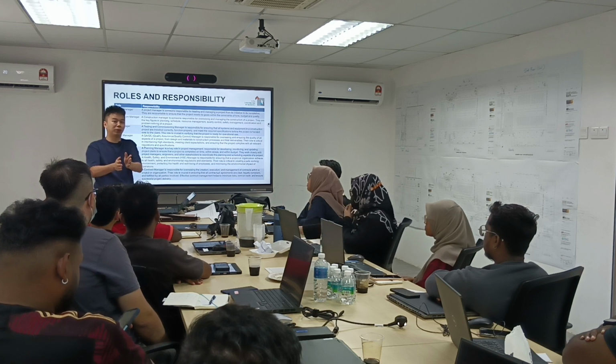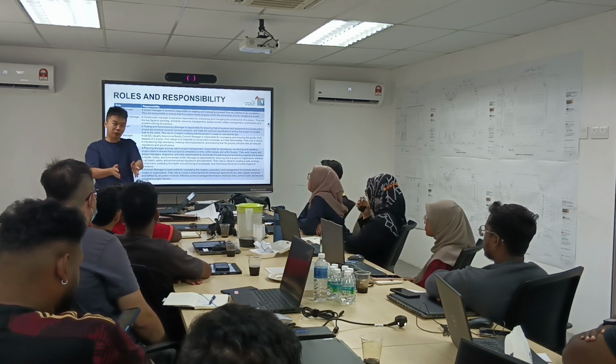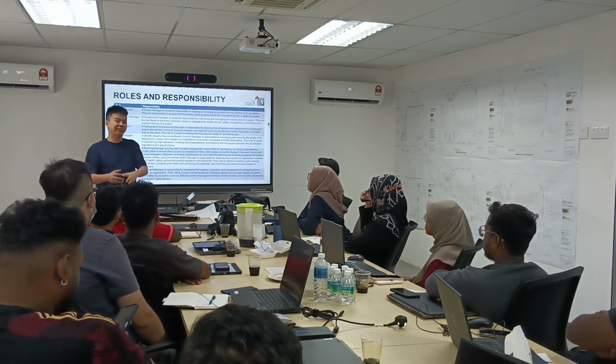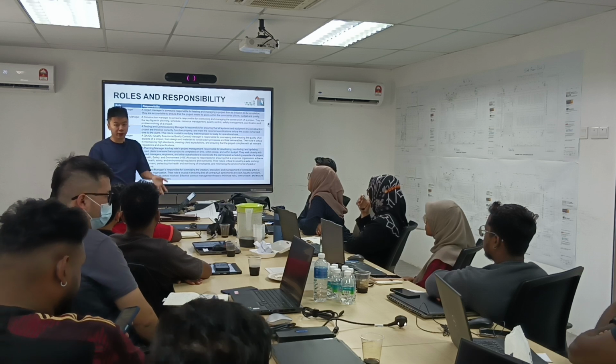Kelvin only has two months left to commission the whole data center. In those two months, he rushed like hell. A lot of things he was unsure of, then he rushed into the IST, and we encountered so many issues. So this is not healthy and not the correct way to do it.